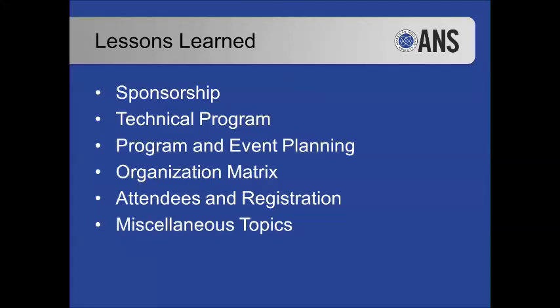I'm not sure what the ratios are for the professionals, but something important to keep in mind is that higher student attendance doesn't actually mean more revenue for your conference, or more money that you'll have to spend. It actually costs you more money because you're taking a hit on each student to make it more attractive for students to come and experience this conference and the benefits it provides. As a part of that, you're utilizing the professional registrations to offset the attendance. So that's a huge thing to remember.